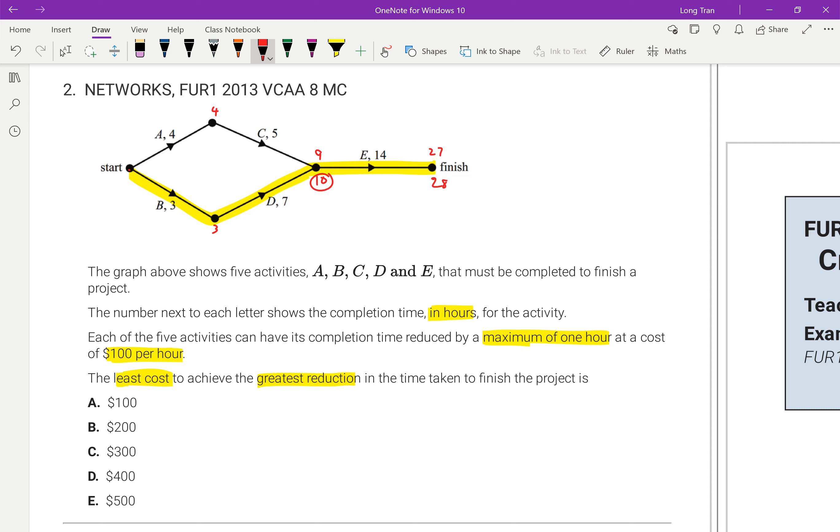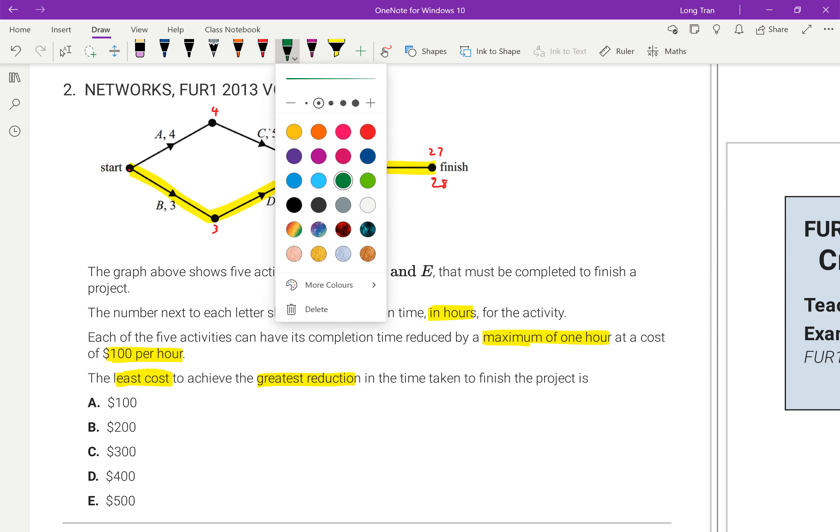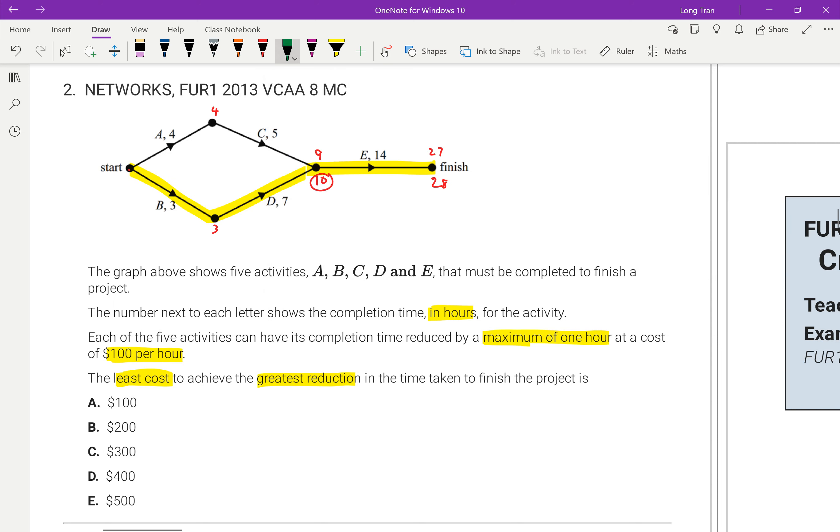Now they want to find out if I can only reduce by one hour, what's the maximum that I can reduce. So the first thing I'm thinking about is I would reduce all the ones on the critical path. If I reduce this by one, that becomes two. Reduce this by one, that's six. And reduce this by one, I think it's 13.